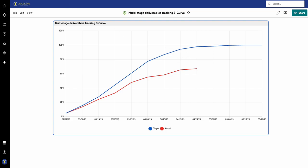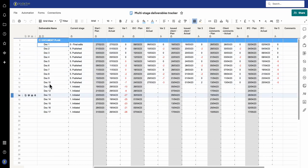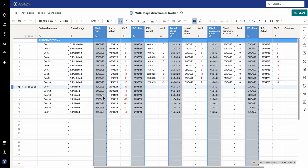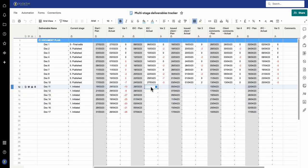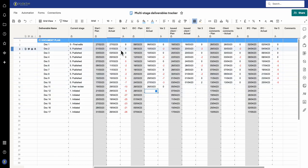So how does this all work? I've shown you already in a sense that you've got a sheet here — this is where you put in the various documents. At the moment it's got 17 documents listed. I've set it up so it can show what the current stage is at, and then for each one it says: what are the various stages that you're going through? These columns are set at the beginning of the plan and are locked once agreed. Then what the users do going forwards is track in the various dates in terms of when something happens. So let's just say that happened on time — it actually happened on the 26th of March — I'll put that in, and you can see it's now at peer review on that stage.